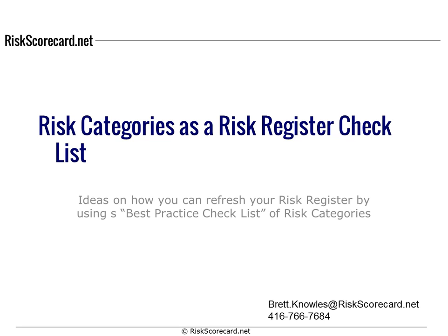They remember risks that happened yesterday better than a month ago. Skew, which has to do with their viewpoint on the organization and the organization strategy. The illusion of control, because if you feel you have control over an issue, it doesn't feel like there's a risk, and so forth. So an alternative that we found useful is to take a list of generic risks, call it a risk category list, tweak it to the organization, and use that.